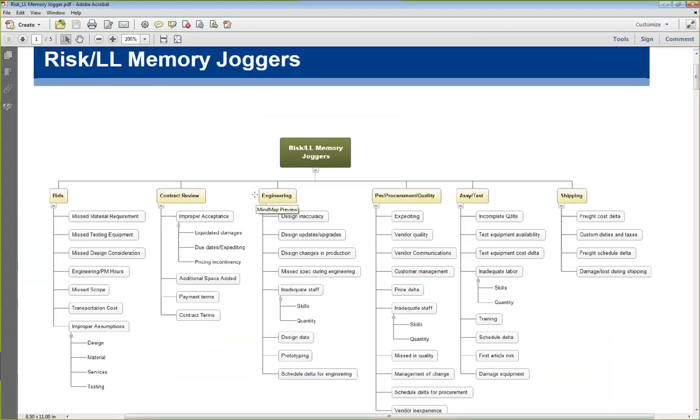Rather than just asking, do you have any risk, we run through this to figure out, oh yeah, that might be an issue here because we are supposed to ship with open containers and we haven't done it before. That helps us bring out risk and lessons learned. You want to do that for sure early on in the project, while you're doing the kickoff, and at the end, so if you have missed something, you will catch it.